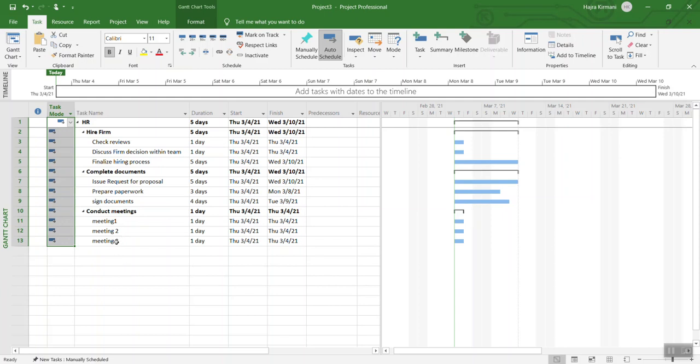What you can do is you can highlight auto scheduling and then drag it until the end, and then it will make all of them auto scheduled. Another thing that I want to show you over here...